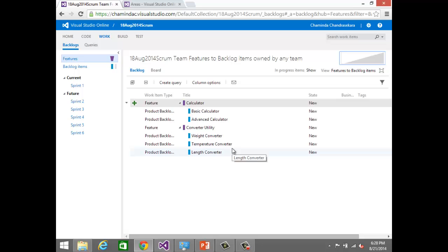He should create it at the backlog level. He should not create it in the current sprint. Why? The current sprint is already planned, something that comes with agile practices, not even with CMMI or the like. You have a planned set of work, so you can't put more work into that. It will ruin everything. The best thing is to add it as a backlog item, prioritize, and identify whether we need to take it right now or can take it later as a team. That should be the ideal way.